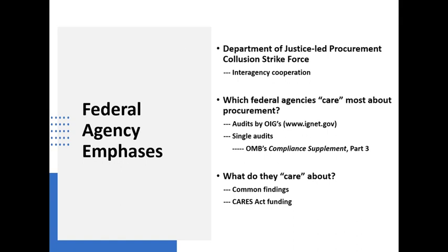Okay, another question says, you mentioned that it was prohibited for a cost plus percentage of cost contract. In our state, they allow our contractor to have up to 10% of costs as profit for our transit service. Because of the CARES Act, we are doing a cost reimbursement to our contractor, including a 10% profit based on costs. Is that a violation of the rules? Sounds to me like it is.